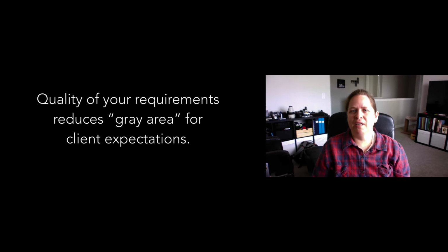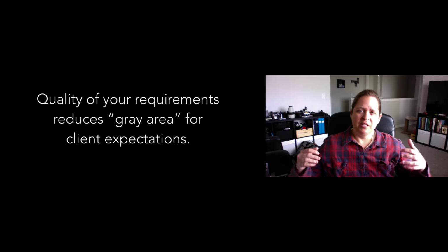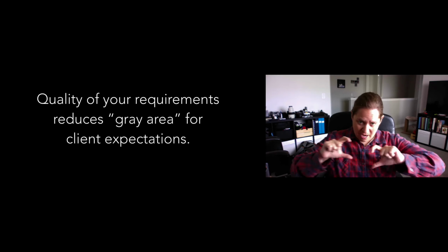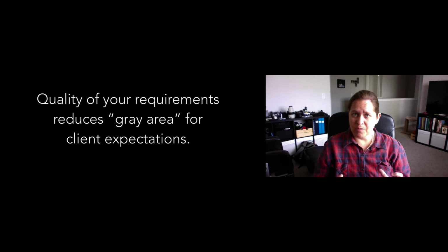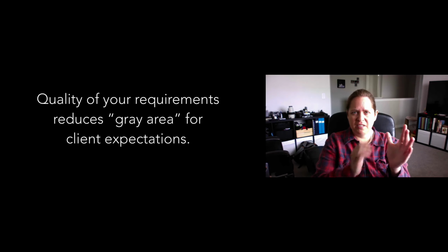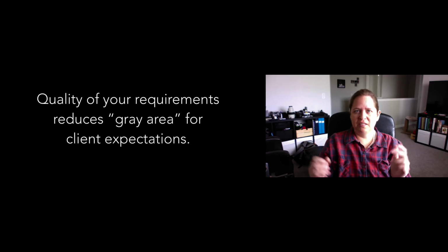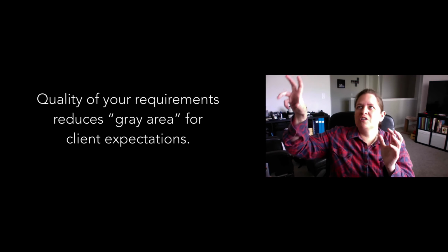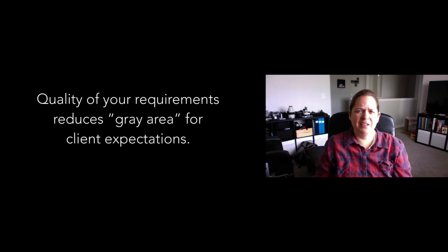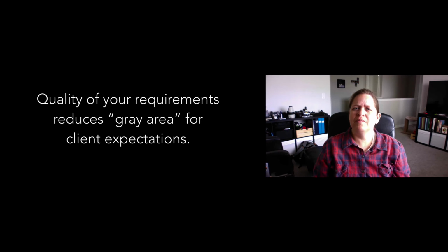That's not a requirement. It's something you can't measure. And so you want to have the requirement be measurable. You want it to make sense, and you want it to say, because of this, the outcome will be this. Not, here's an emotional thing that could happen. It doesn't help anybody. So make sure that when you build them, you have concrete, purposeful requirements.